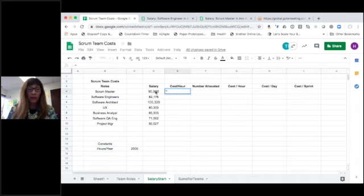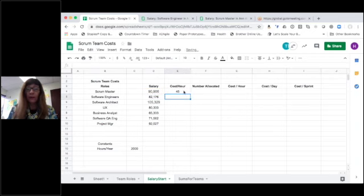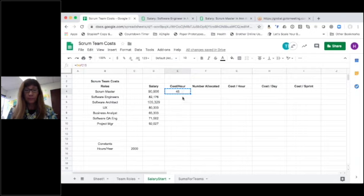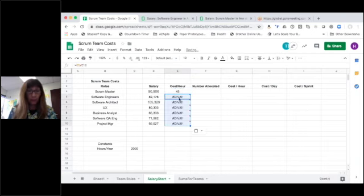So let's do this. Let's take the salary for our Scrum Master divided by the number of hours per year. So now I get their cost per hour. And I can do the same for all of these roles.